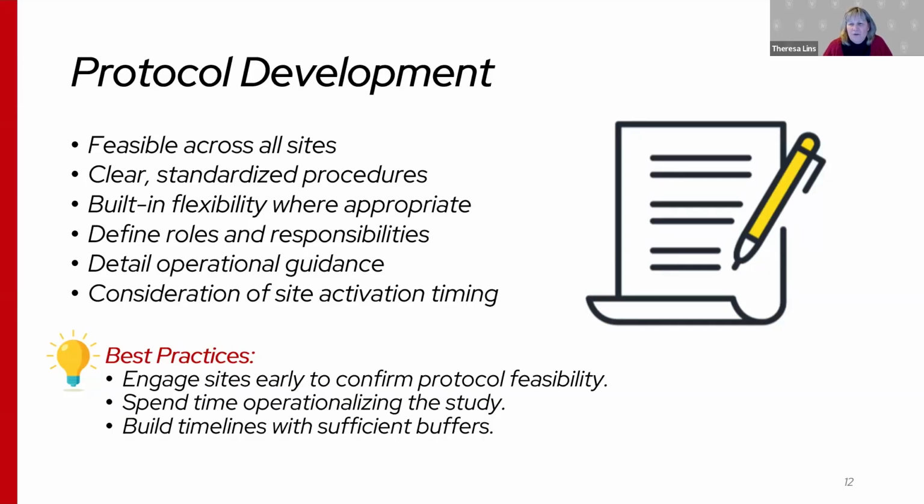Make sure you have defined roles and responsibilities. Clarify which tasks belong to the lead PI, the site PIs, the coordinating center, and the data teams. And then detailed operational guidance. Include visit schedules, assessments, timing windows, and handling of deviations. And considerations for site activation timing. Protocol should support staggered startup and enrollment to ensure each site receives the appropriate attention, support, and including time for troubleshooting.